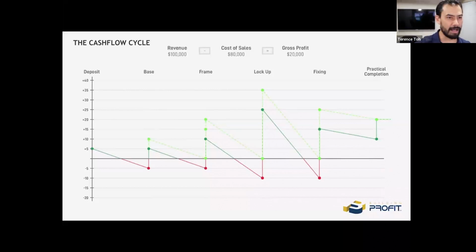So you still end up, the interesting thing about this is it's just cash flow. It does not improve profitability whatsoever. Okay. So the basic concept behind this is get one payment ahead. And you can do that with method B if you structure it well. Now, the next thing I want to show you, and you avoid these kind of points in time where you're heavily cash negative, right?